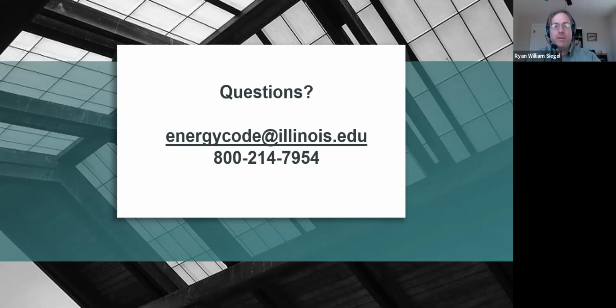Another related question is, can the contractor be the commissioning agent? That is potential. Again, it goes back to whether the code official finds that acceptable. You may find that on smaller projects, code officials may say, yeah, that's fine if the installing contractor does the commissioning, because as part of the site visit verification and inspection, the code official would likely be looking to double check some of that work too.